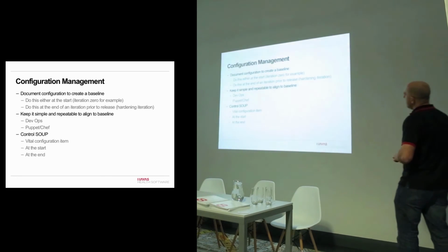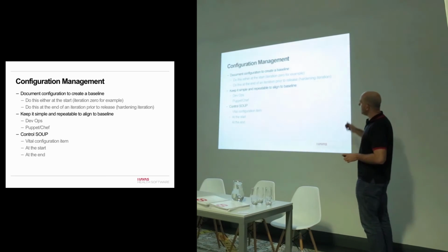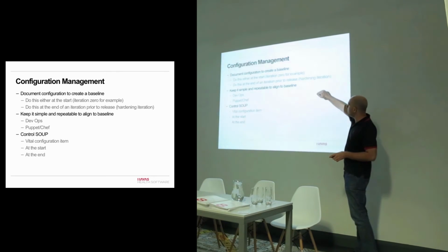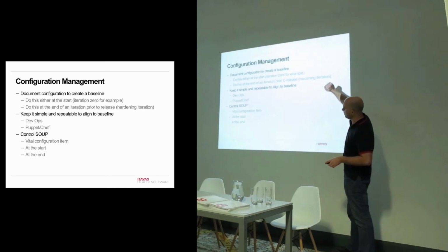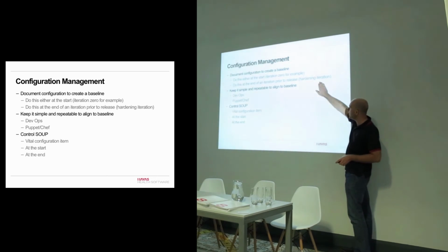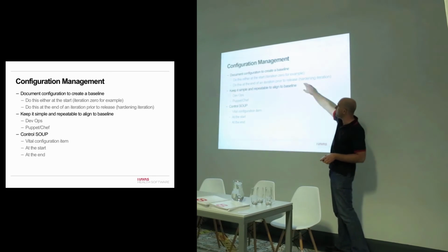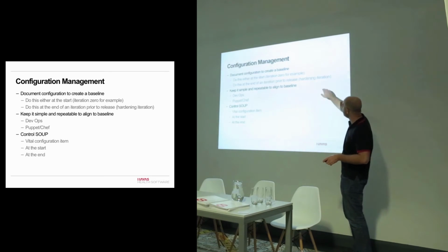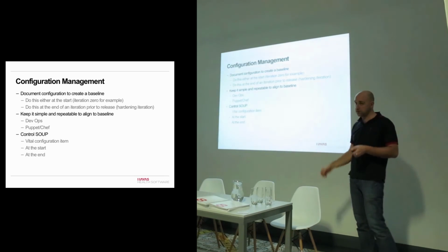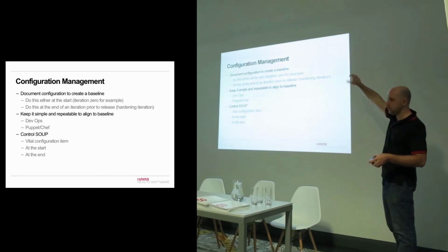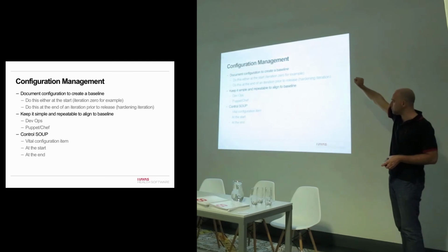Very, very worth it. The other thing about baselines as well is that you can create a baseline at the start. You can do it at the end possibly as well. If you're going to do it at the start, then great, but do it in iteration 0. You can do it at the end and do it in a hardening iteration. TR45 doesn't talk about those things. I've added those things. That's my bit of advice.